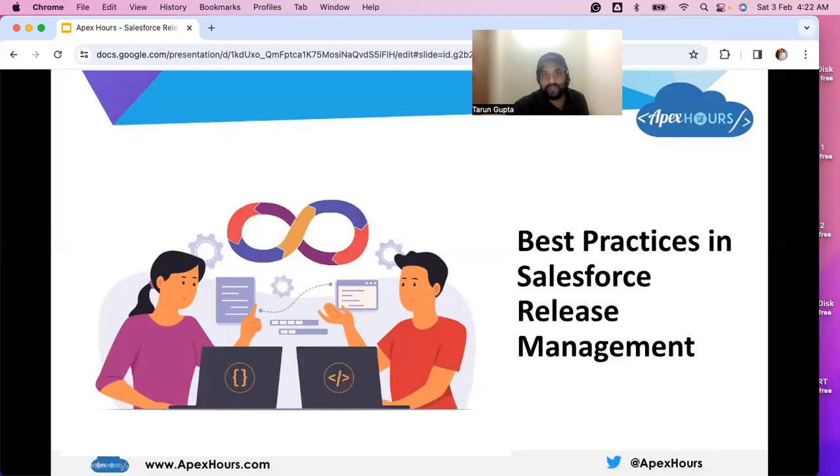Then schedule a release day. You may choose an option for the release day, estimating the standard process of preparation. The best practice is that the release day should be on a mid-week day like Thursday. I recommend Thursday because it allows ample time for preparation, including different checks and merge configuration validation. The preparation period will be 3 days. Allocating 3 days for production release preparation ensures thorough review and validation of the changes.